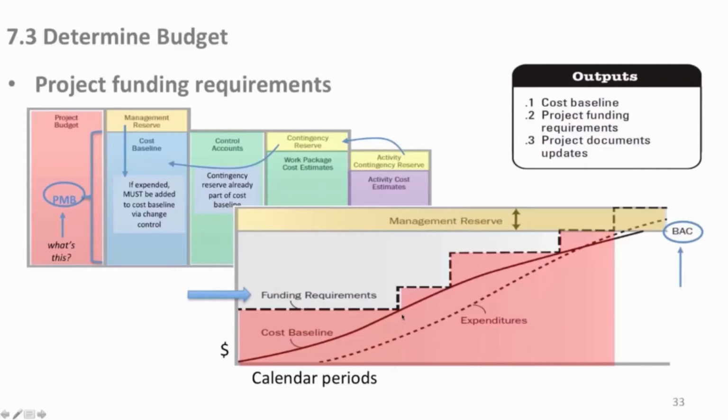Whoops, you ask for it here. You spend it, okay, and then you're down to nothing, or at least down to nothing as far as they're concerned. Then they'll fund it again. So they need to know when these funding levels hit, and you need to hit them. And now, if they're not going to get money here for a long time, you're going to have to stop and wait for the money. But you should know that in advance and compensate for it in your schedule. So this is a good graph to have. You should have something like that on your project, so you know when you're going to need money. And here's your management reserves up here that may or may not go away. And again, if you use some, they pump down here, and these funding requirements pump up because you've used them against that. So that's funding requirements.